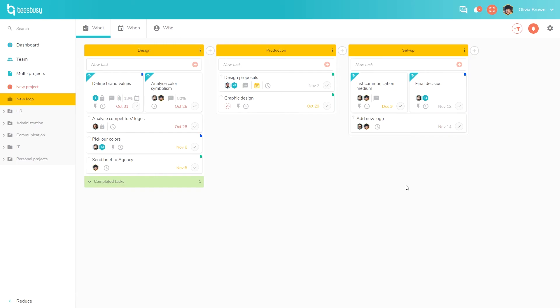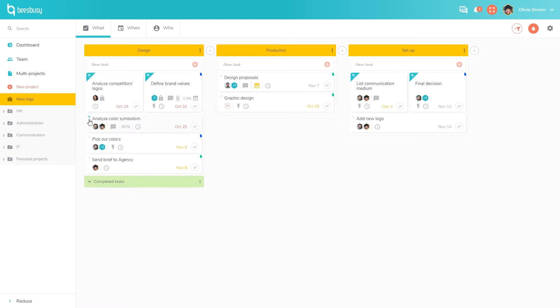I told you about priority tasks, and so in BizBizy we want to set up good practices. So for each task list here, there cannot be more than two priority tasks. So for example, if I click on this task to set it as a priority, you can see that the last task will automatically go back to the regular task list. That way, users have to define their priorities clearly.